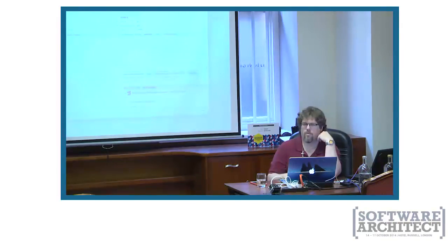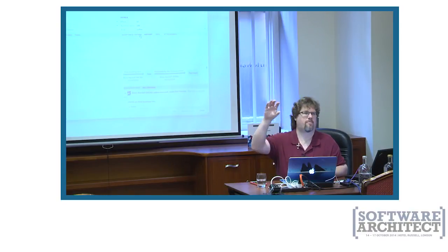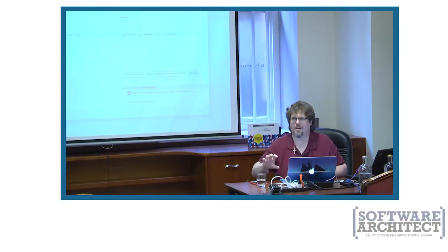Now you might be wondering what iteration and area are. Well, they're really straightforward. Iteration is when you're going to do it. Area is the general category of what you're working on. You have free control over both. For areas, you can think about if you're building a product like Office, you might have top-level areas that are Excel, Word, PowerPoint. And within them, you might have subchunks. You can go up to, I think it's 14 levels deep on those trees.